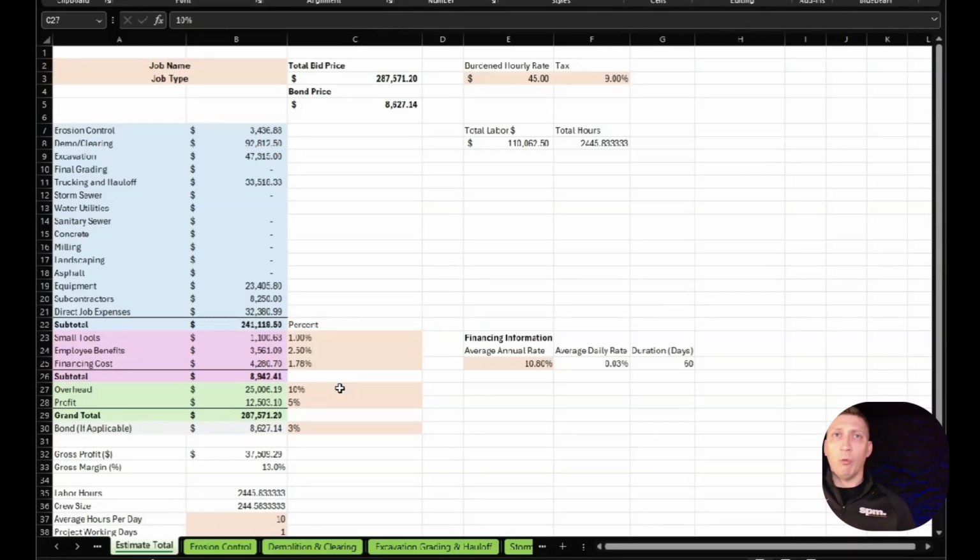If we think about why, we have change orders that hold us to 10% overhead, 5% profit. When we're estimating, we can put whatever we want. We can put 500% overhead just because we want to. And if we win the job, cool, they signed up for it. But when it comes to a change order, if I have a 500% overhead or an 18% overhead, I am eating the cost to do that change order. So it helps to know it. It helps to job cost everything.